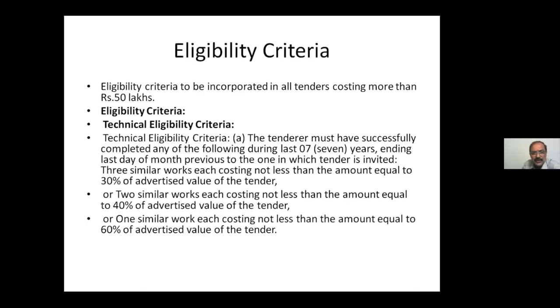Here I would like to tell one more thing regarding service contracts. Service contracts mean outsourcing, housekeeping, and coach maintenance done by the mechanical department; they all come under service contracts. They also have general conditions of contract like works tenders. The GCC in works is the same as in service contracts. The eligibility conditions are also the same: one is technical eligibility and the other is financial eligibility. What is the difference? The only difference is in the technical eligibility between works and service contracts.